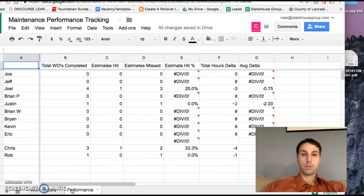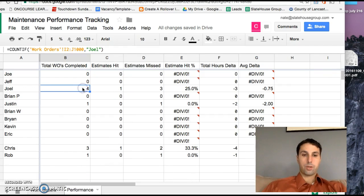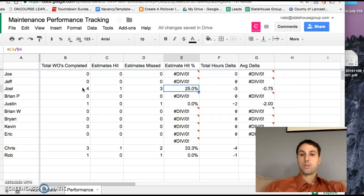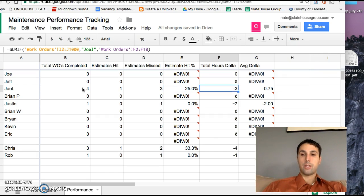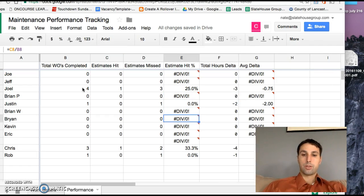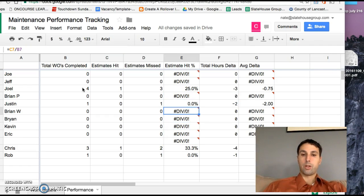And then what we're going to do over here is we're going to track your performance, and for instance, Joel had four total work orders, he hit the estimate once so he has a 25% and he's missed the hour mark by a total of three hours. As people start completing work orders, these will fill in with the data.